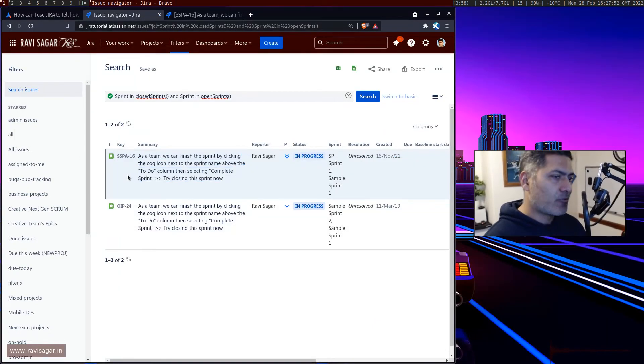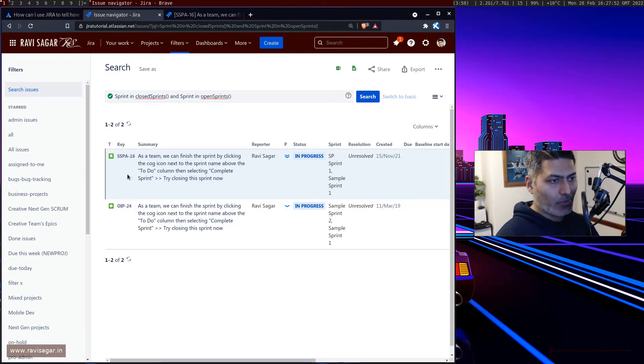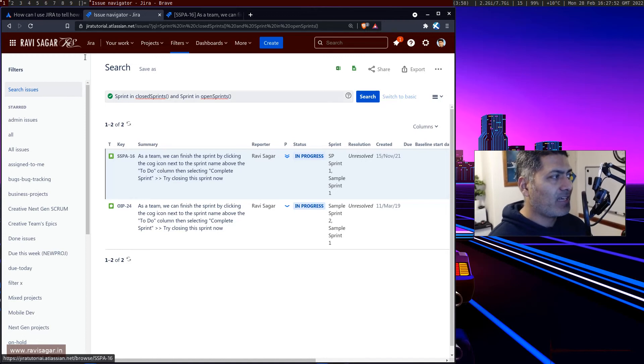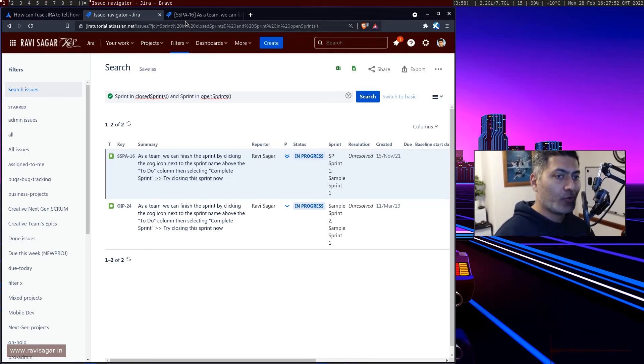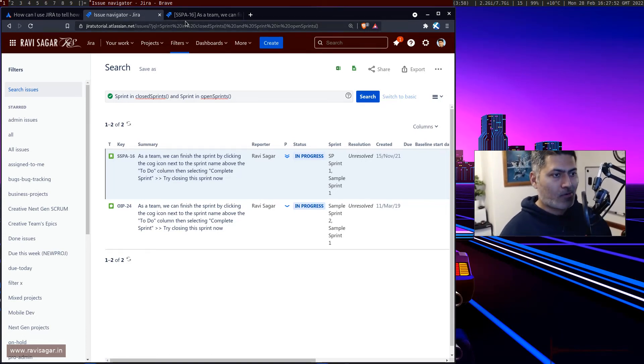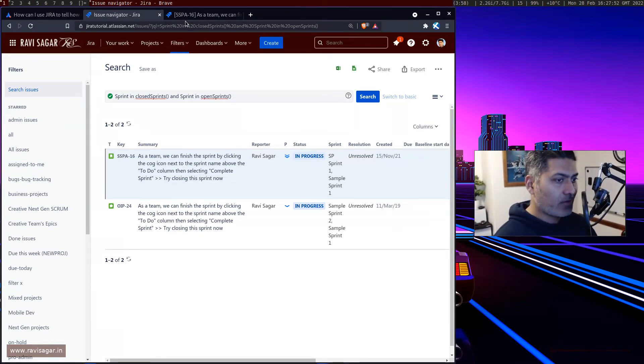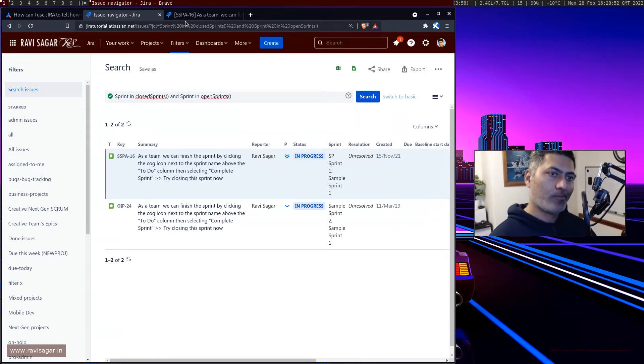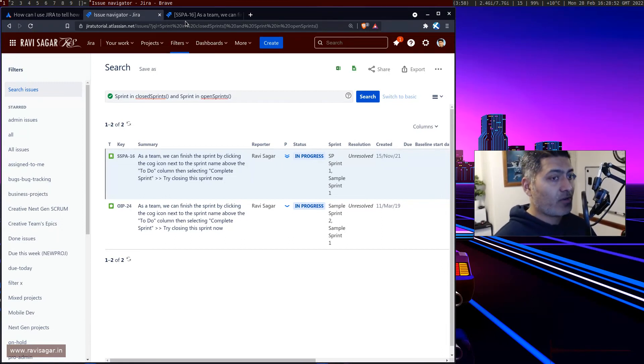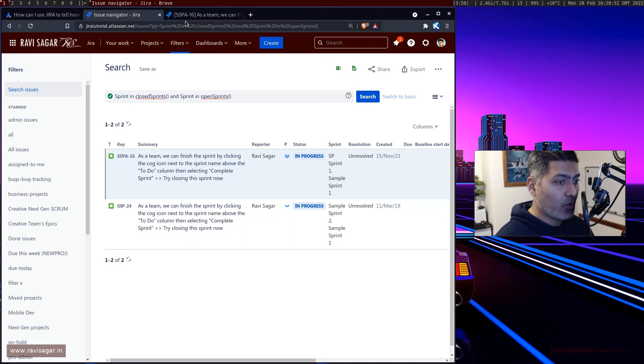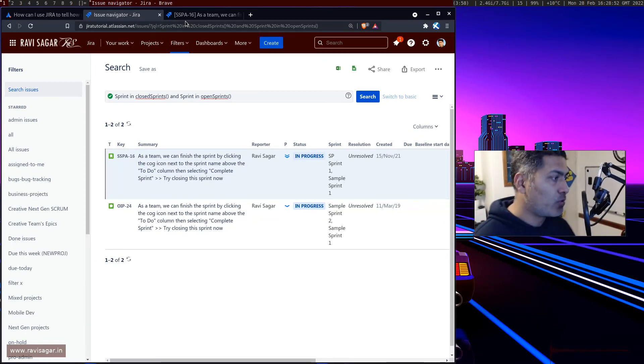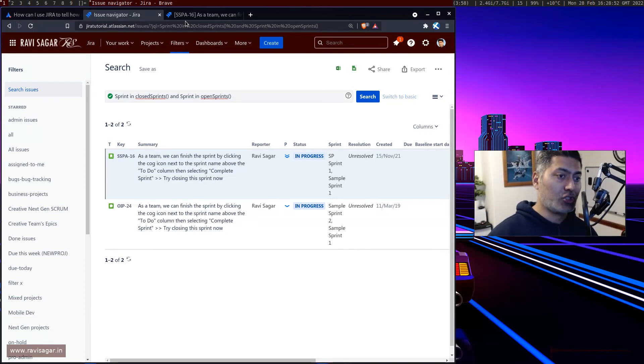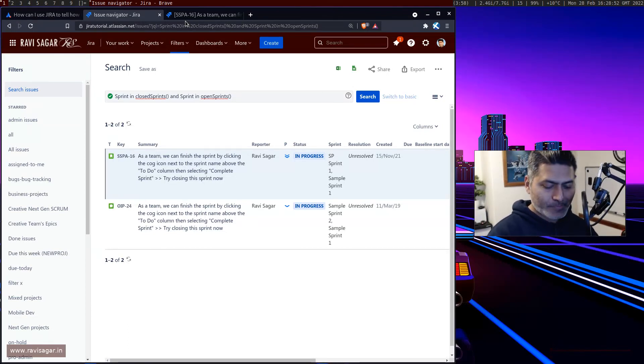In case you want to report on it, as I mentioned before, ideally you should try to review this on a regular basis. If this is happening quite often, then there is a problem, and try to maybe not overestimate the work that you think your team can deliver. Also take a look at the velocity charts that will show you the capacity, and based on the capacity, plan the work for future.